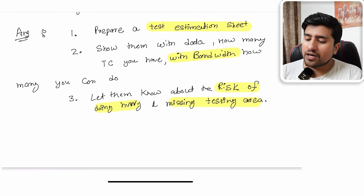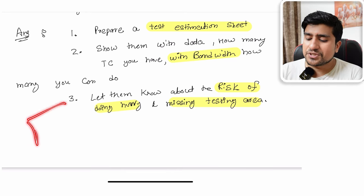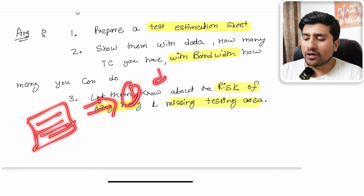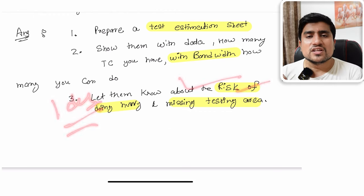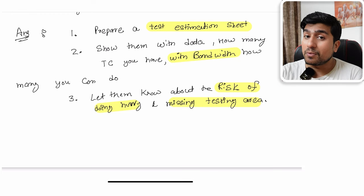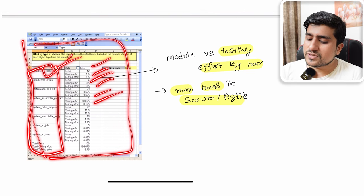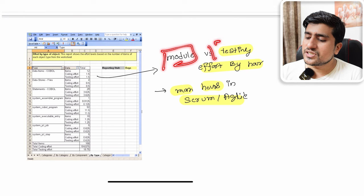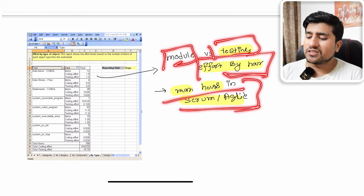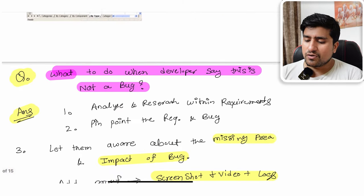It is your responsibility as a QA to divide your modules priority-wise and start executing. For a one-day timeline, present the test estimation sheet showing whether the task is achievable and what risks are involved. The estimation sheet will have modules listed along with the testing effort in hours — 'man-hours' versus scrum story points. In Scrum and Agile environments, these are the terms you will use.